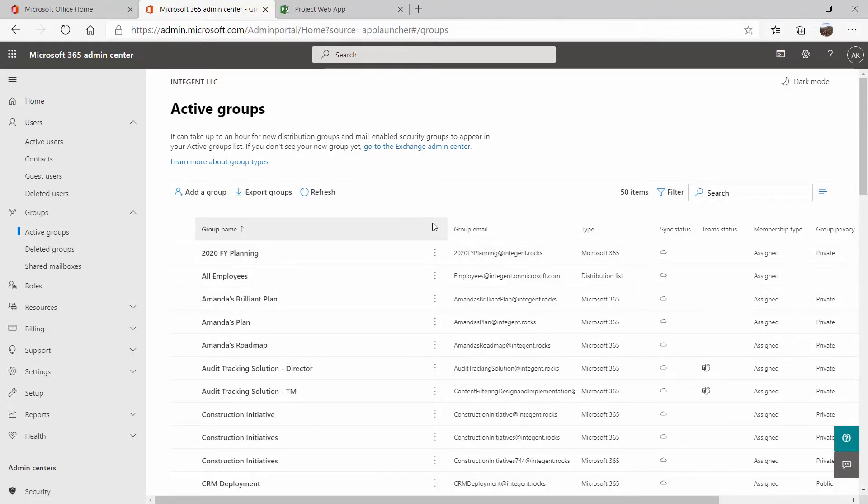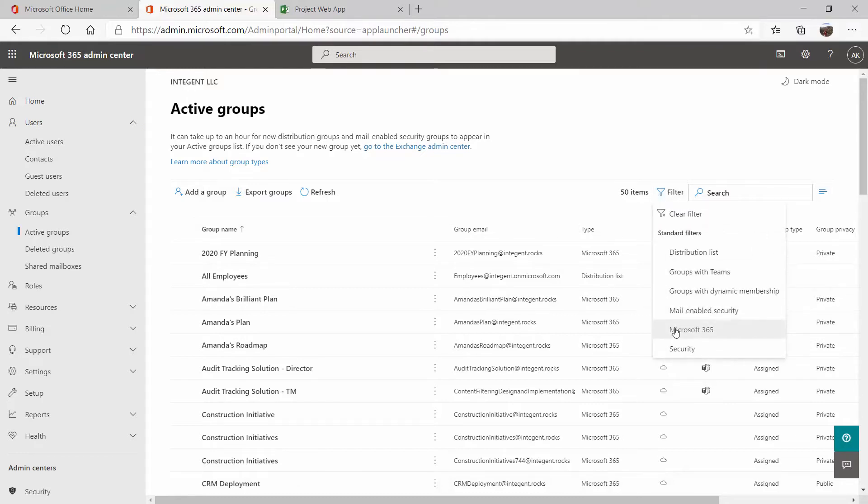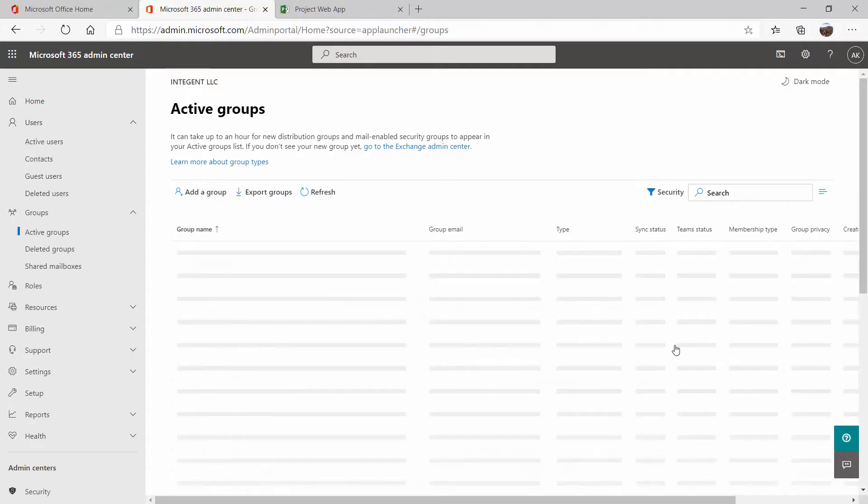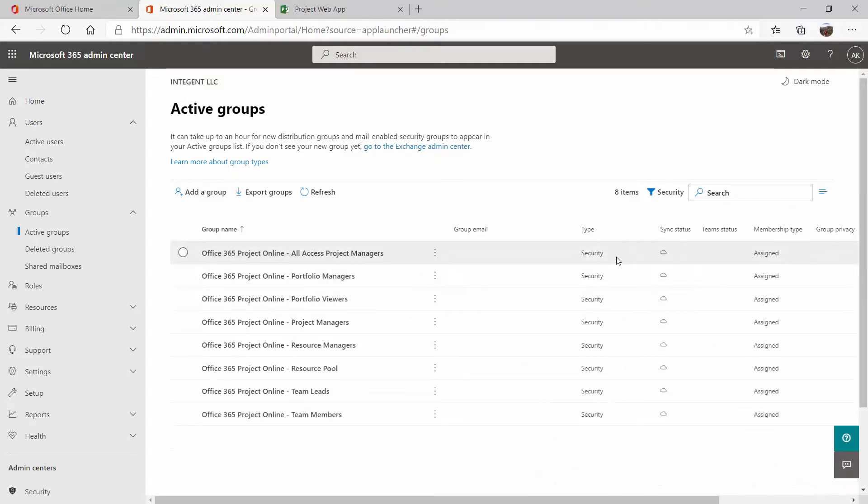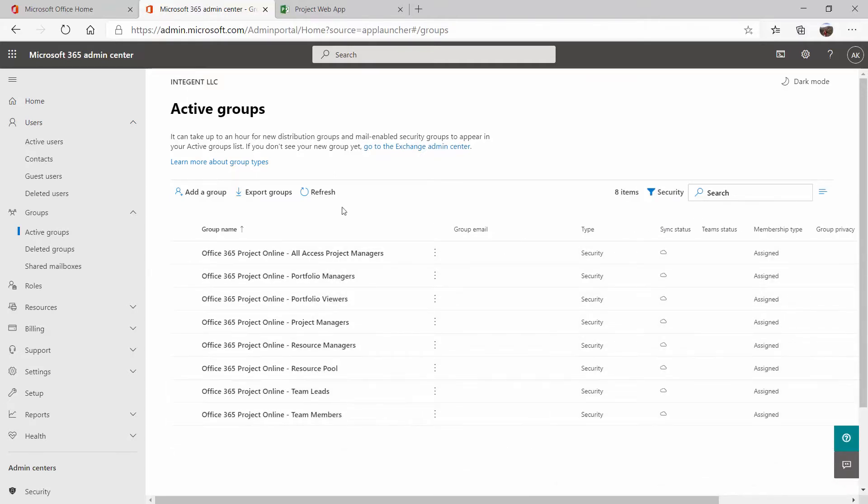And to set up security groups, those do need to be classified as a security type. I do already have some here set. So if I want to filter for security, you can see I do already have several groups here defined for Project Online that I can use to sync and add users to.